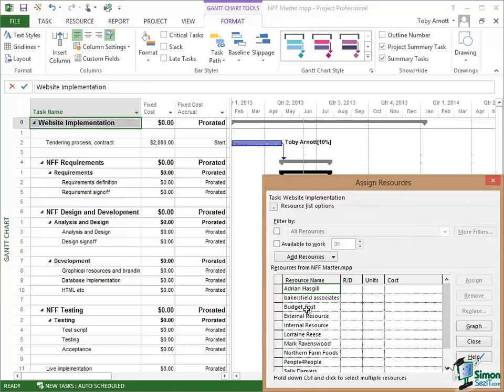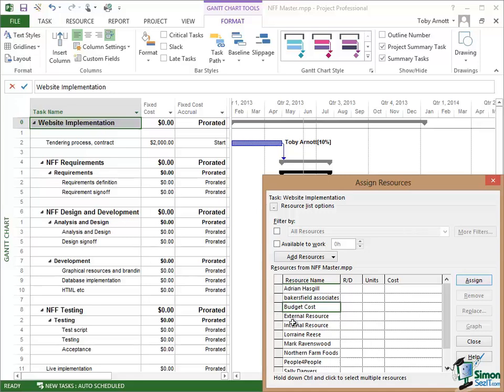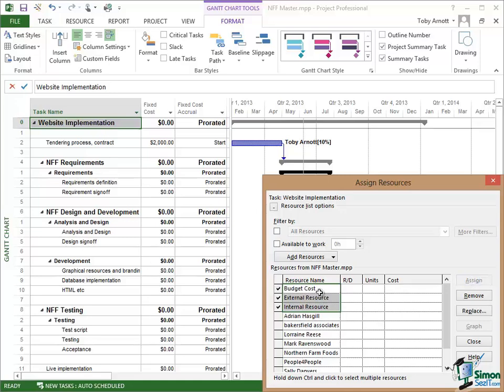Click on Assign Resources, and I'm now going to assign those three budget resources. Now at the point of assigning budget resources, you cannot enter the number of units. You can only assign the resource to the project summary task. So I'm going to select Budget Cost, External Resource, and Internal Resource and click on Assign. All three of those are now assigned. You can see the tick there but obviously no figures at all. Close.